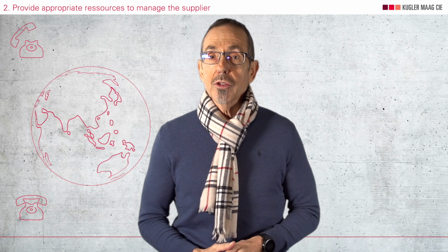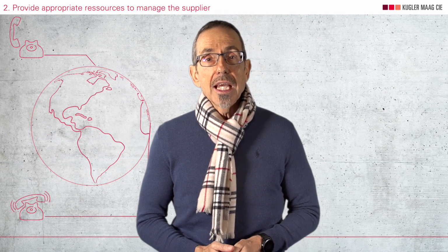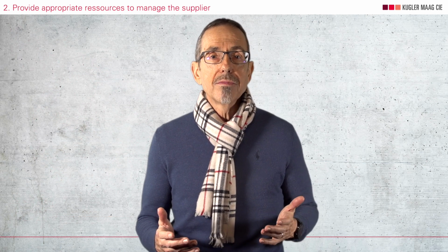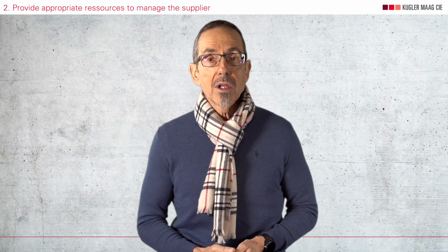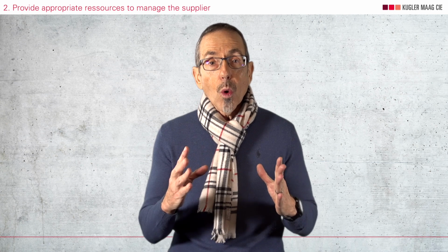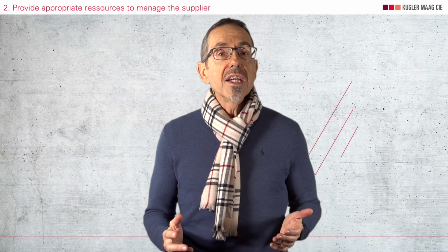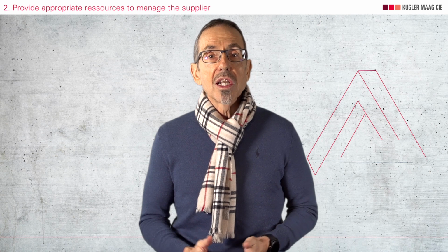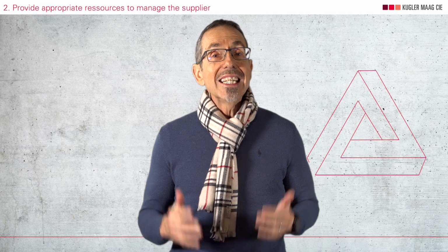Especially for far-shore suppliers with cultural and language barriers, the effort can be many times greater compared to a local supplier next door. I've seen how supplier managers dealing with far-shore suppliers were implementing short, incremental development cycles. On Monday, they discussed the requirements. On Wednesday, they checked the software delivery and determined the deviations from the requirements. And next Monday, they started all over again.